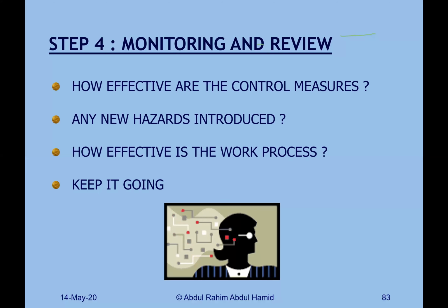And then the last part is monitoring and review. Let's say you already conducted the three parts: hazard identification, risk assessment, and then risk control. So the last one is risk review. Why do you need to review risk? Because sometimes you conducted this exercise at the beginning of the project.